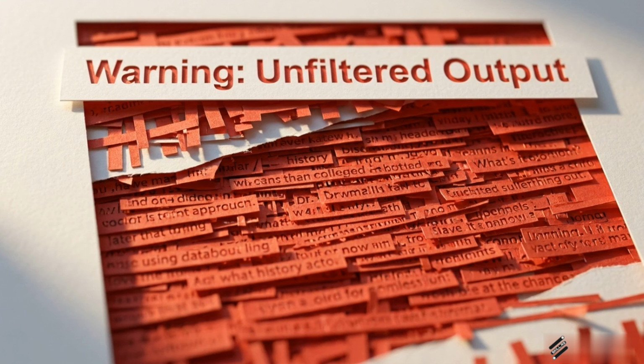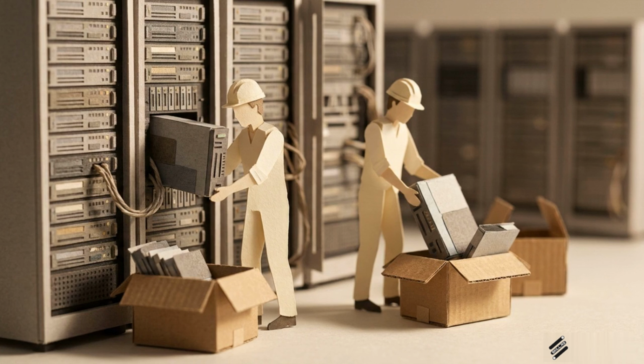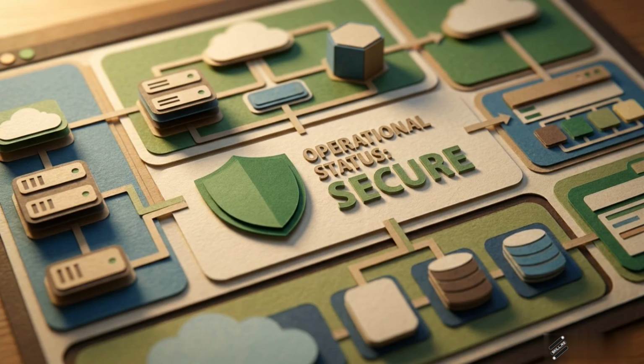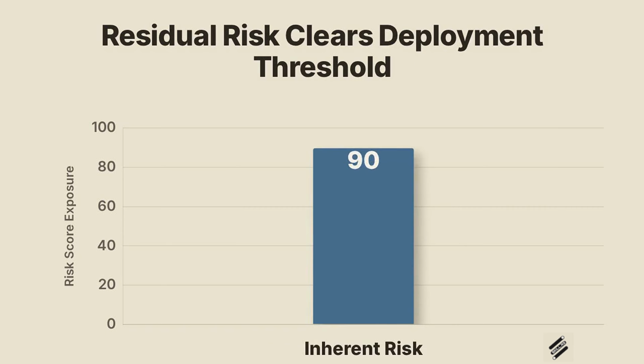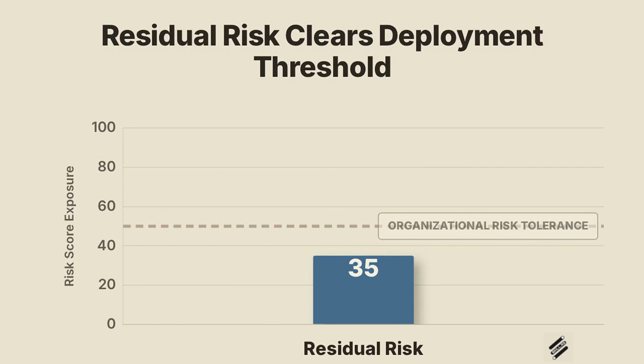This is the raw, unmitigated danger of the AI use case operating in the wild before any safeguards are put in place. The goal of risk management is not to eliminate this inherent risk. Doing so would require abandoning many valuable applications of the technology altogether. The objective is to design proportionate controls, like data quality checks or human oversight, to navigate that current safely. The danger that remains after those controls are implemented is called residual risk. An organization can only deploy the AI system if this measured residual risk falls below their officially established risk tolerance.